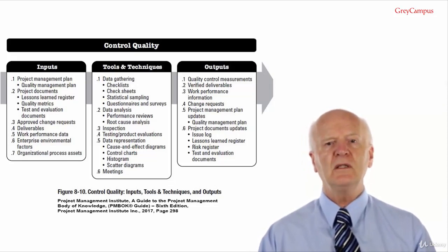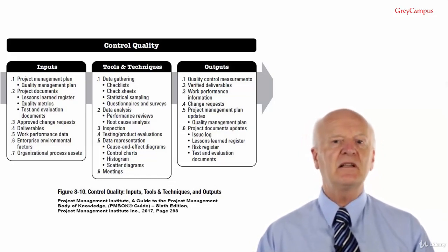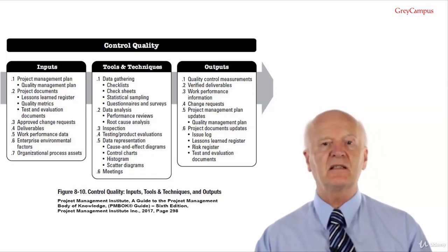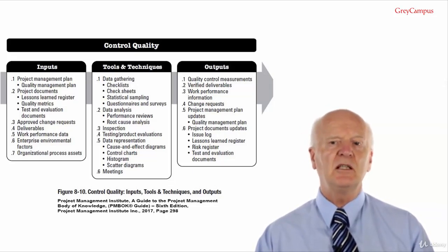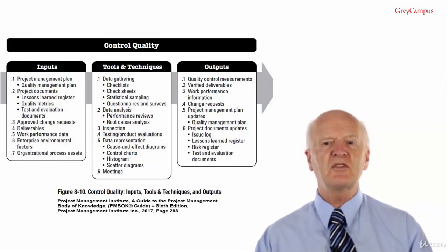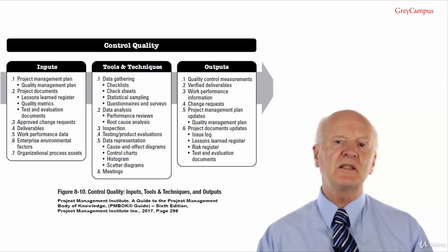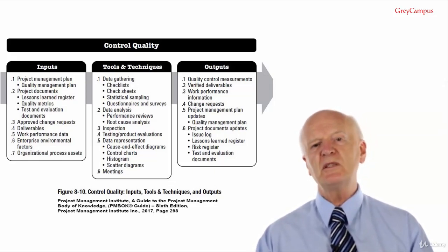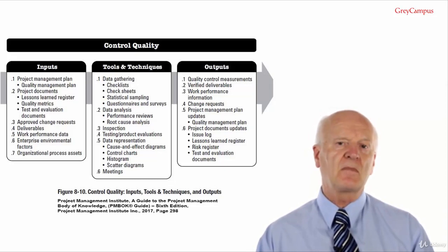Upper and lower specification limits are based on the requirements and calculated using standard statistical calculations. They show the maximum and minimum values allowed. The project manager and appropriate stakeholders may use the statistically calculated control limits to identify the points at which corrective action may be taken to prevent performance that remains outside the control limits.